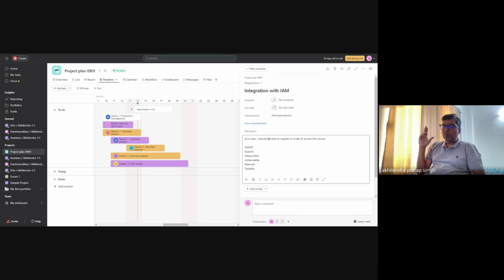So when a person registers on a website, or if you write any user story, and that functionality cannot be tested, there is no way you can know if this was actually done, then you should not write that user story. For example, if there is something technical, something happening in some logs as part of your project, now technically you can always validate these things, but I'm just taking it as an example.